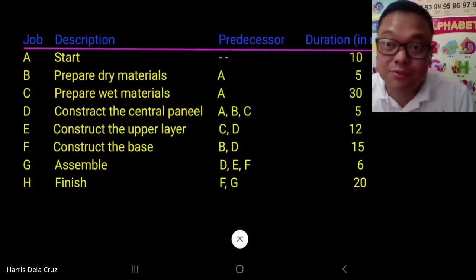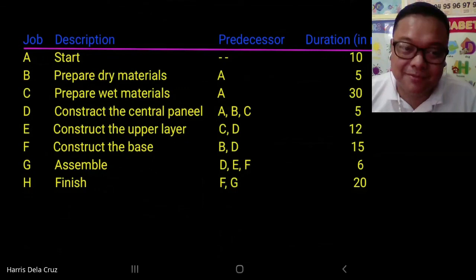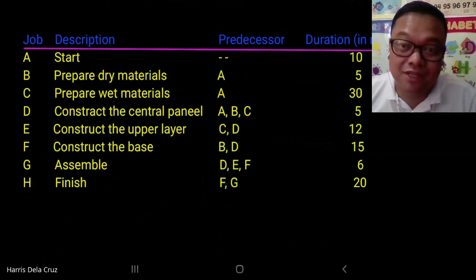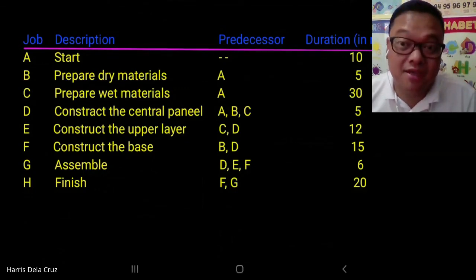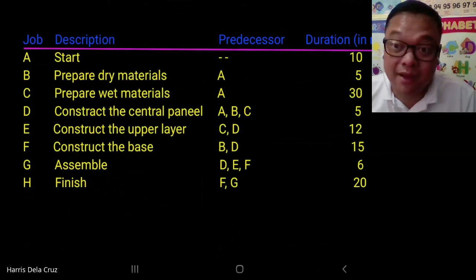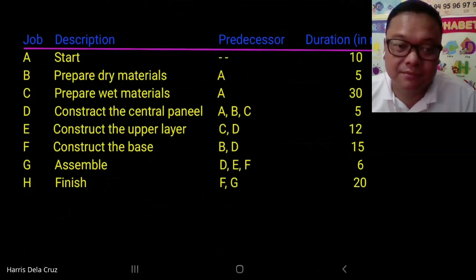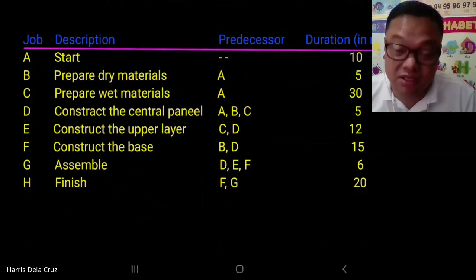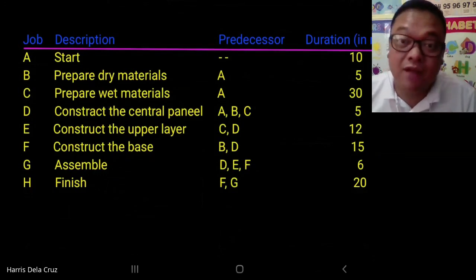Suppose we have the following schedule with jobs A to H. Job A is the start, job B is prepare dry materials, job C is prepare wet materials, job D is construct the central panel, job E is construct the upper layer, job F is construct the base, job G is assemble, and job H is finish — each with the following predecessors.